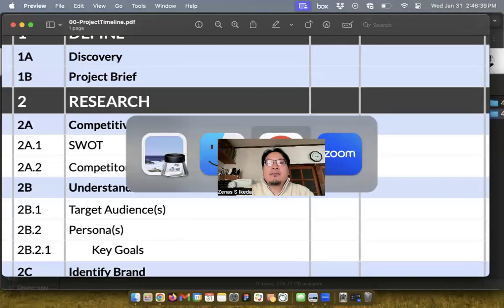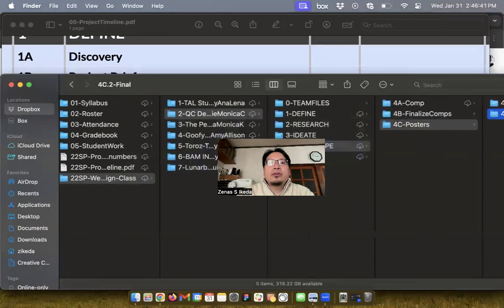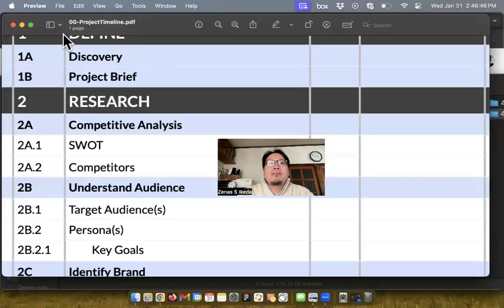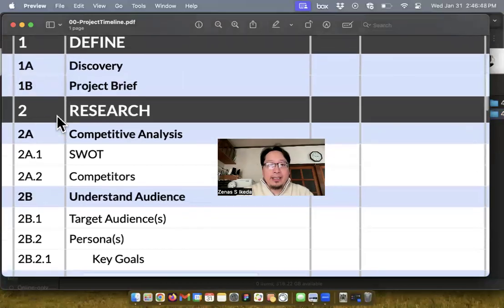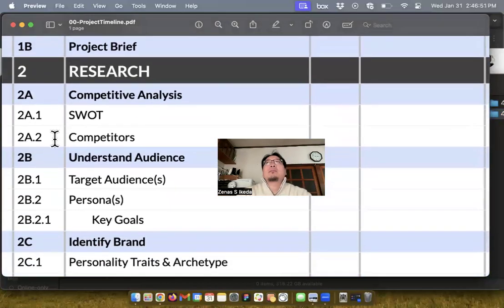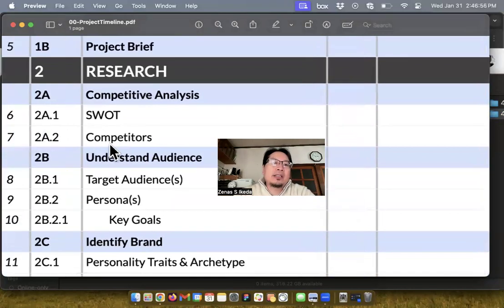And when you do the template, where do you put the task ID on that template? A lot of the time they will put the task ID in front of the phase. So they'll put like 2 hyphen research, or if it's the page name, the document title, they'll do 2 hyphen competitive analysis. Other times they will just have it down in the footer and say task ID is 2A, et cetera.